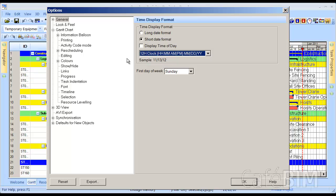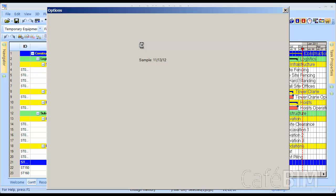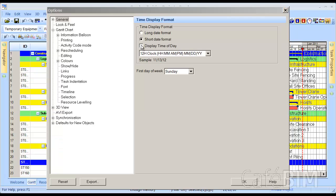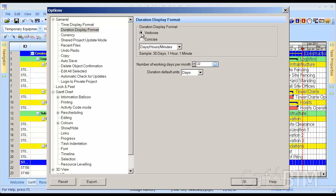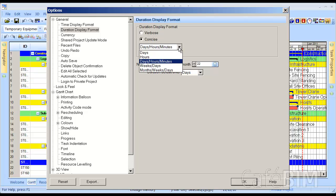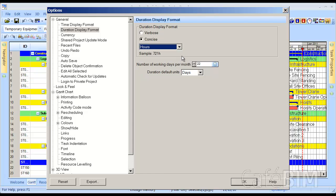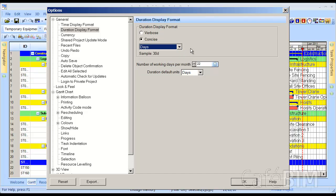There's also a checkbox to display the time of day, and depending on the application that you're in, you may want to use that, and you may not. It's all user preference. I'm going to expand General, and I'm going to go now to Duration Display Format. We have two options: Verbose and Concise. Verbose basically writes out days with the full word, whereas Concise will just have the letter D with no space. This drop-down allows us to tell Synchro how we want it to display our durations.